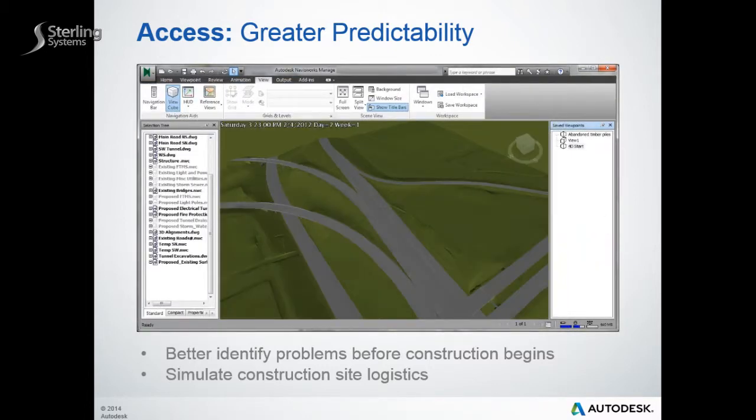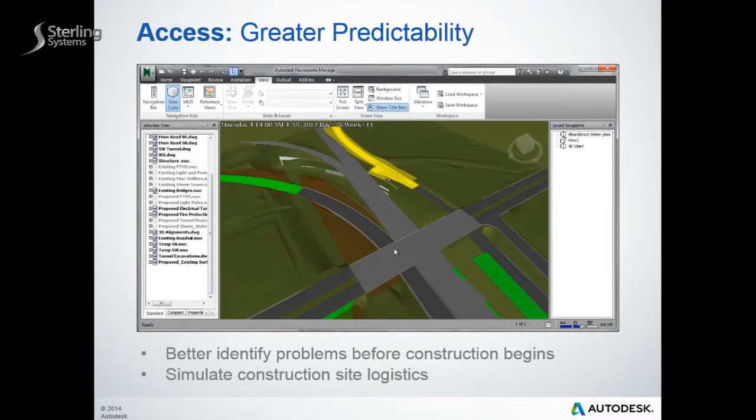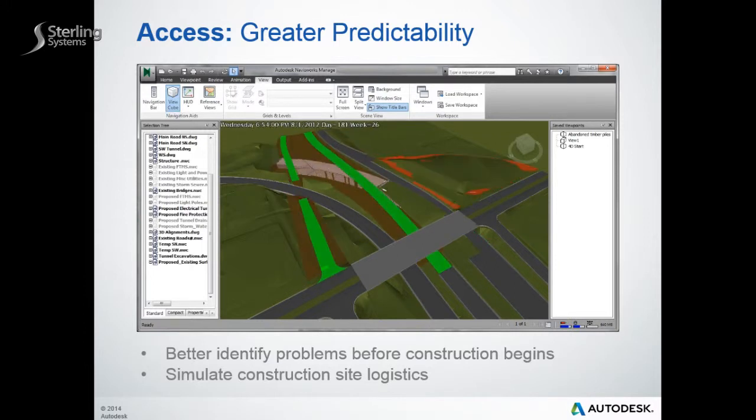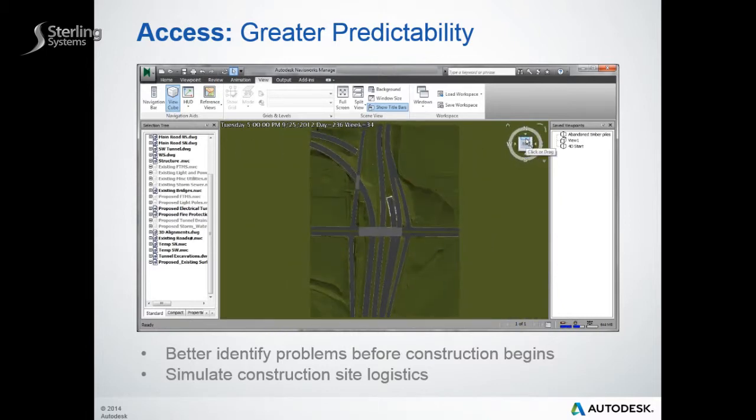When it's time to break ground, enhanced 3D models can be used to help sequence construction activities and guide construction equipment. With help from Autodesk Navisworks products, project engineers can visualize 4D sequencing to help improve staging and scheduling and to better direct field teams. This can help speed project completion by minimizing idle time for workers while helping to better predict leasing, maintenance, and fuel costs for construction equipment.